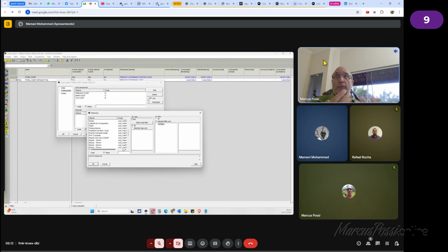The concrete set means an amount of sand, stones, cement, and some water. When you say I want 1 cubic meter, all these 4 components will be added automatically and calculated per cubic meter of concrete.